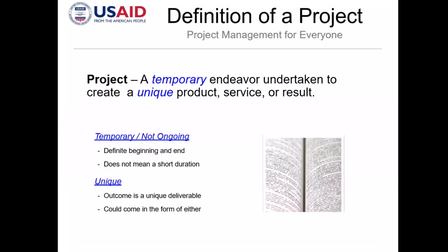All those concerns about maintaining it, or if there's a fault after you have completed the project, should be under operations already, so a different team should be handling that. So please remember this: a project is a temporary endeavor undertaken to create a unique service or result.